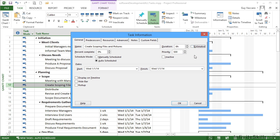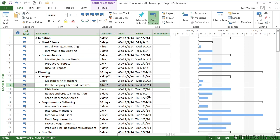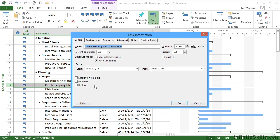But it does make a difference because if we flag it, we get a question mark, and then that whole section. So if I were to flag the scoping thing there, for example, as estimated, it then says actually the whole scoping section is estimated. Therefore, the whole planning phase is estimated, and the knock on effect is that the whole project is therefore estimated. So I would use these question marks sparingly. Back into the box, I can take the tick out, so they're there, but be careful with them.